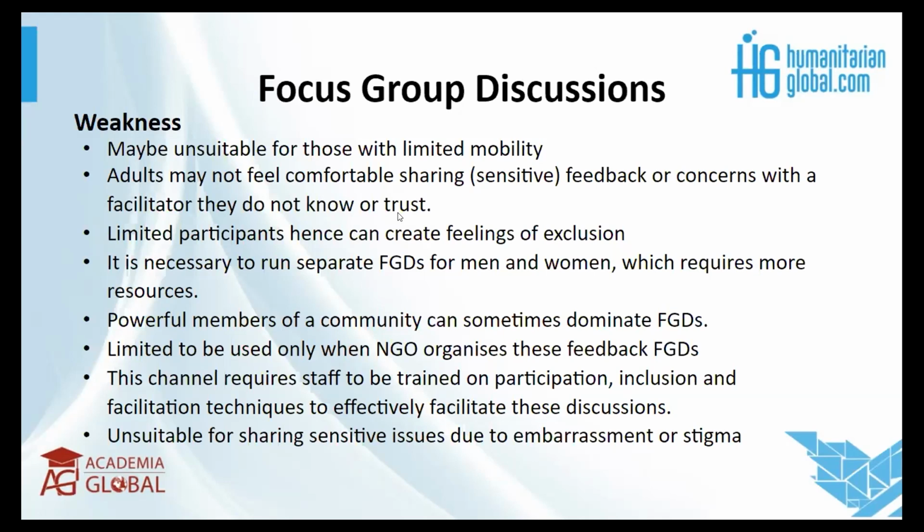So in a female group, have two female facilitators. One can ask the questions, and one can be the note taker, and you can always interchange this. Even the note taker can still ask more probing questions or seek clarifications, but they can support each other. And just in case, sometimes things happen, maybe one may not feel well, so it's important to always have that contingency as well. But that is a factor of human resources as well.